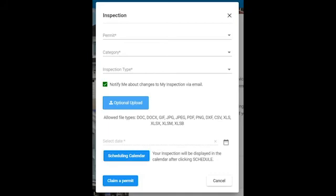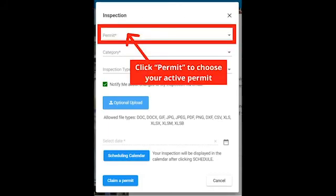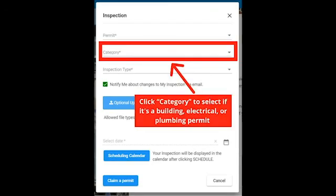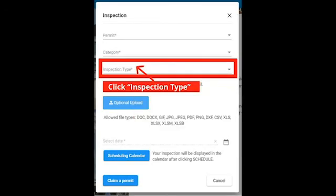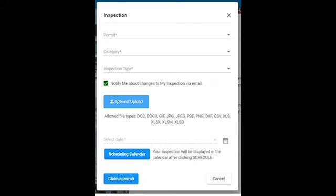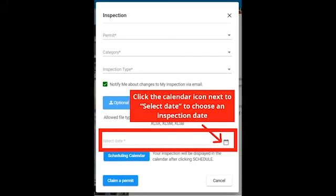Now that you have claimed your permit, you may request an inspection. On this page, please select your Active Permit, Inspection Category, and Inspection Type.